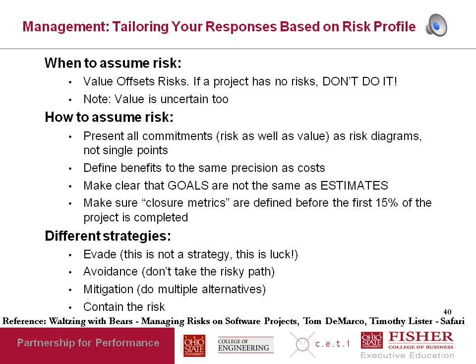Or if using a language that nobody understands or nobody has experience with, or using an enterprise application framework like, say, .NET, when nobody knows how to use it, is a risk, then simply don't do that. Implement it using something you do know. This is risk avoidance.